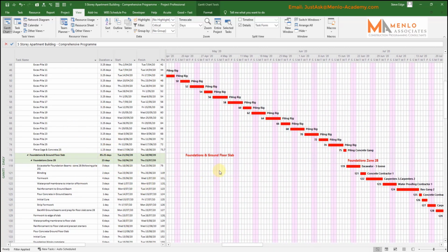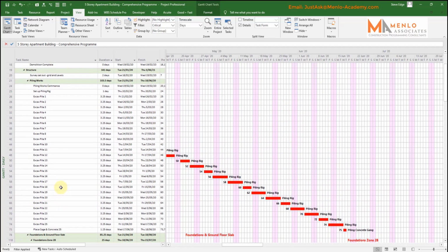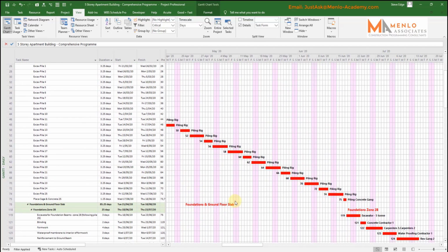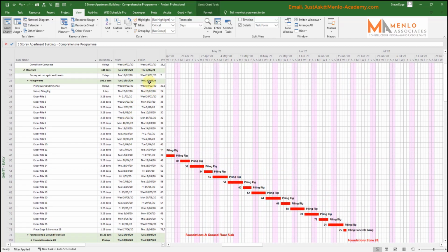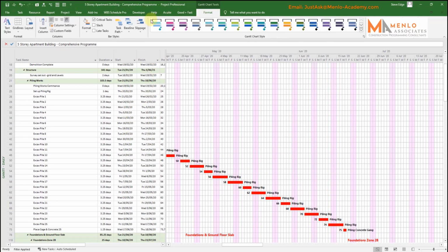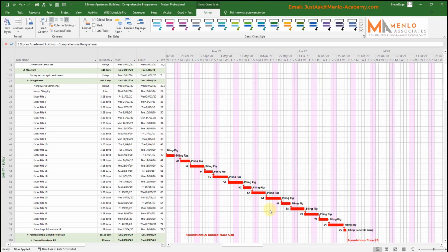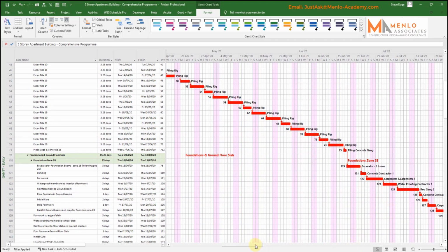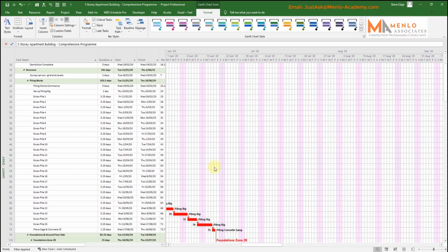Sometimes it will be jumping between different areas. If you've set up the program to show different zones, it very often will be going down here and then up here and across, and the link lines show the relationships to actually how the critical path runs between different areas and zones. Hence, I will show a critical path that shows the link line, so that if this section was, say, up here, it would show the link line running up here and show how the chain of work goes together.